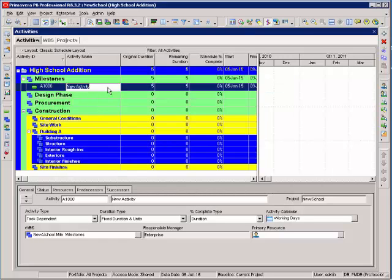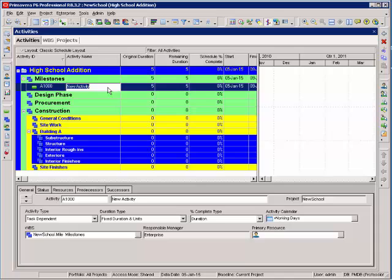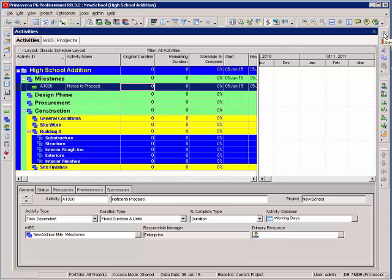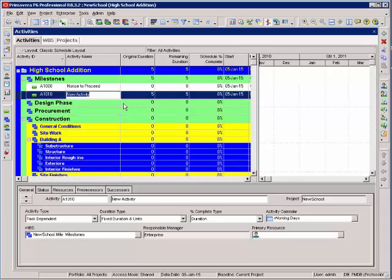Then I'll type in the name of the activity. Just notice to proceed. I've got a zero duration. Now to add the next activity, I can either hit the plus sign or I can select insert and type substantial completion.